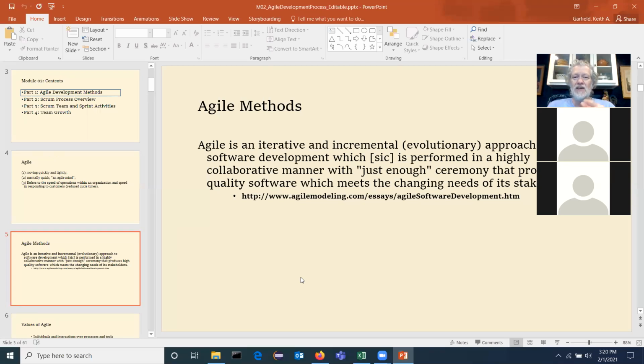Now, pay attention to these words, incremental and evolutionary. That's what these sprints are. So it used to be more along the lines of, we get all the software requirements, we get all the software design, we build all the software, we test all the software, a classic engineering technique. Now it's, we have an idea of where we're going, we get all the requirements up front, and then we start to develop tasks, and then we complete a couple tasks and test, and then go back to the customer and say, hey, are we on the right track?